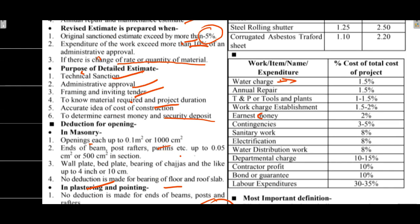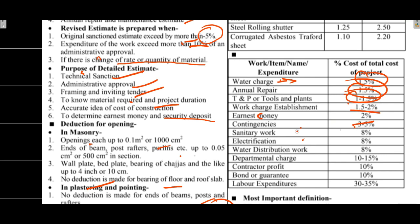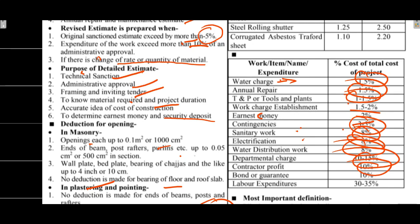Work charge establishments are very important. Water charge and annual repair is 1.5%, total 3%. Tools and plants are around 1.5% of total project cost. Earnest money is 2%, work charge establishment is 1.5% to 2%, contingency is 3% to 5%, sanitary work is 8%, electrification is 8%, water distribution is 8%, departmental charges is 10% to 15%, contractor profit is 10%.